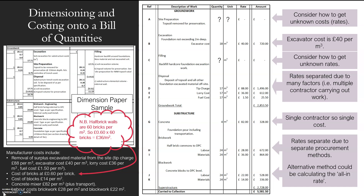Quick workshop on dimensioning onto a bill of quantities. On the left I have all my dimension paper with my abstracts — excavation, site preparation, all under groundwork, then brickwork, blockwork, concrete under substructure. I've separated them out because when I go to my bill — which I can create on Excel or any other format — I have groundwork here and substructure there.